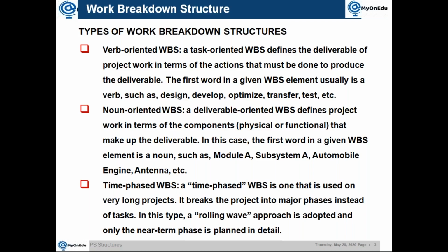Or you can have it time phased. Time phased is one of the approaches used in very long projects, for example, phase 1, phase 2. That way also you can have it. So these are some of the naming conventions, or how the WBS is, how the project is broken down into pieces. These are some of the examples.